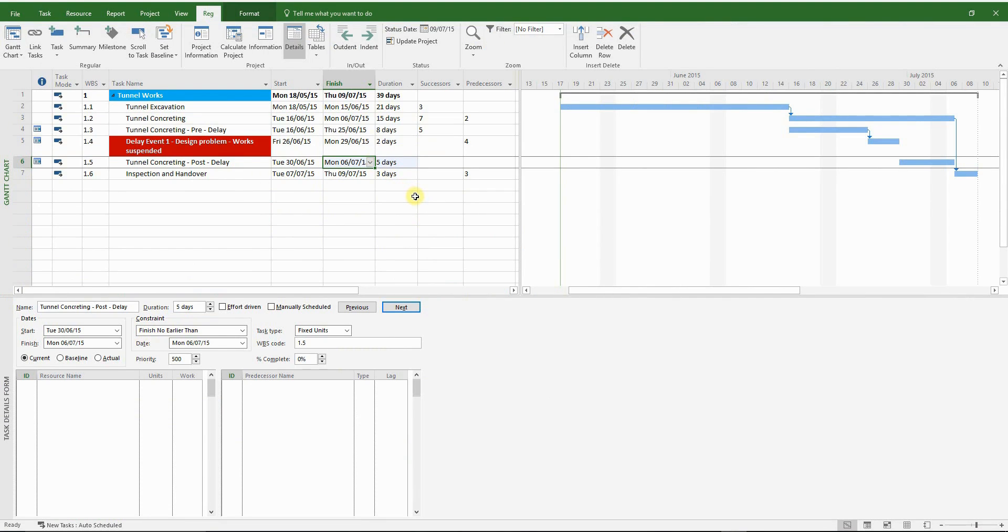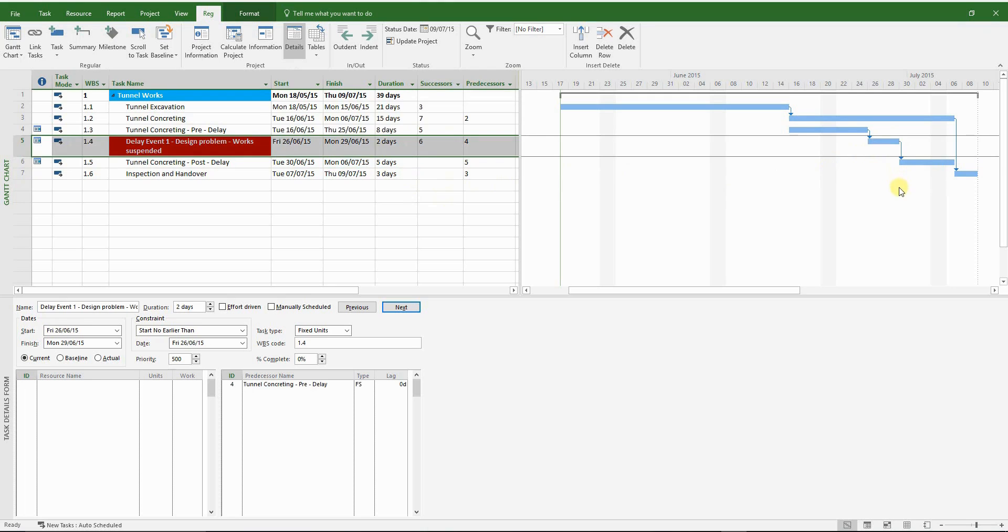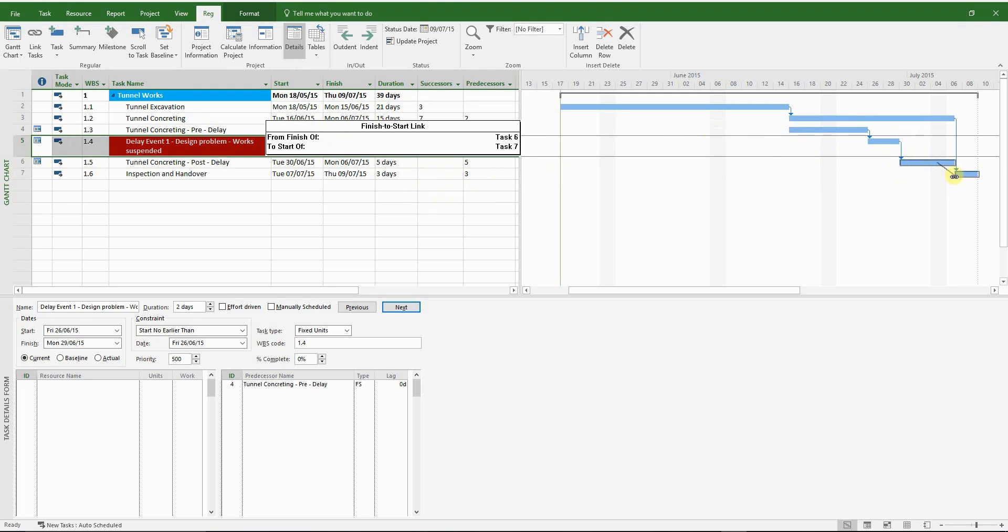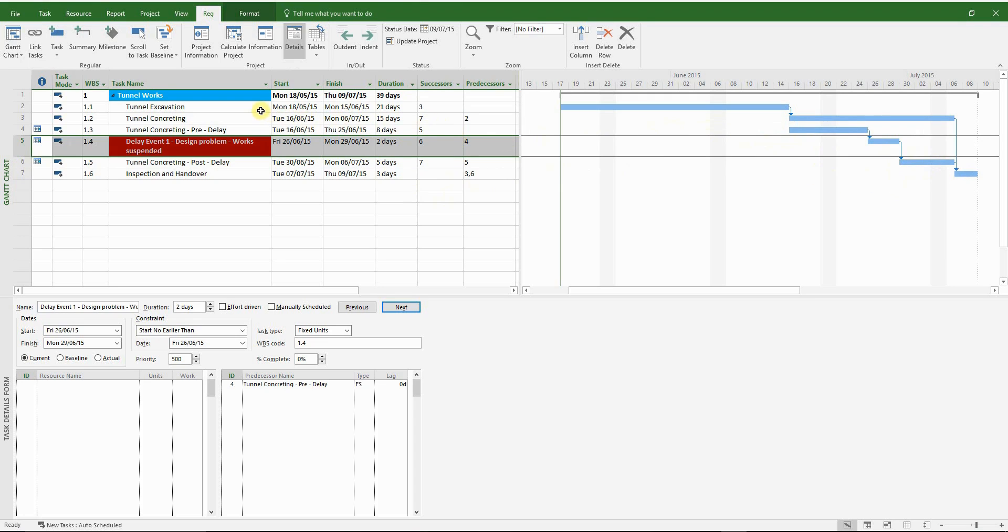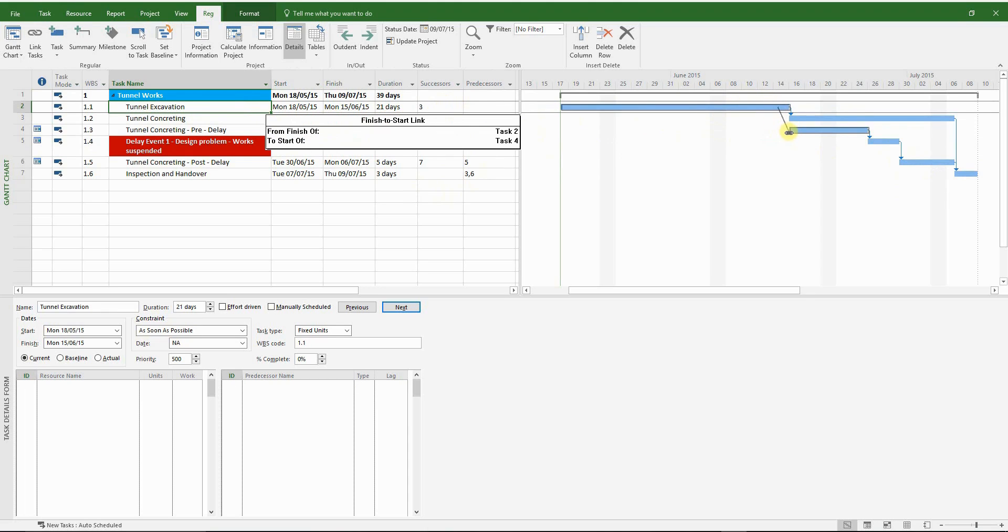So our fragment is almost complete. Let's put a finish to start link from the delay event to the tunnel concreting post delay. And a final finish to start link from the tunnel concreting post delay to the inspection and handover. So the finish date hasn't changed.